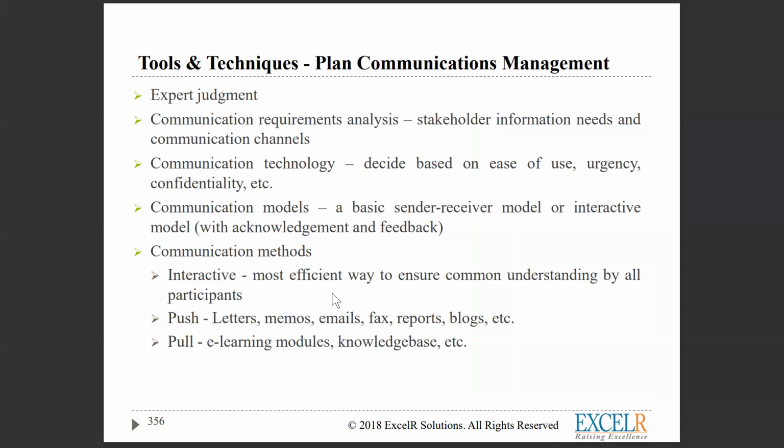And then the stakeholders also, when we are doing communication, invite all your stakeholders, telling them upfront how I'm going to communicate, who is responsible, at what time, with what frequency they will be communicating to you, and who will be the spoc for that communication.